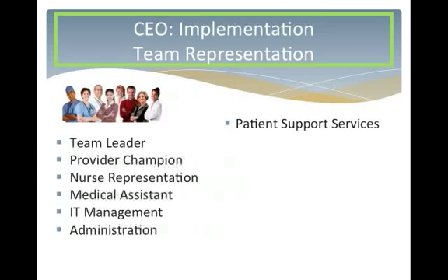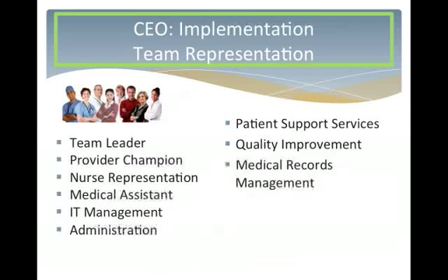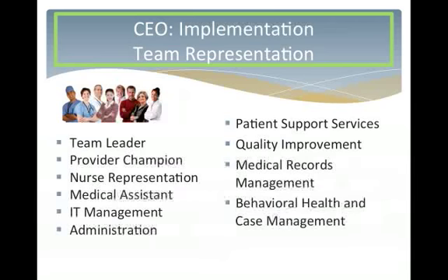Quality improvement and data are key in reviewing our initiatives and identifying what we can easily pull from the system and what fields may need to be created so a report can be run. Since we joined our health center controlled network, we have benefited from significant leadership and support in these areas. Medical records needs to be involved as they will learn a new skill of scanning documents and inputting data into the chart. The Behavioral Health and Case Management Department may also go live at the same time as the other services. We have decided to stagger their go live 8 weeks after primary care goes live. Primary goal is to integrate these often separate charts into one shared medical record.